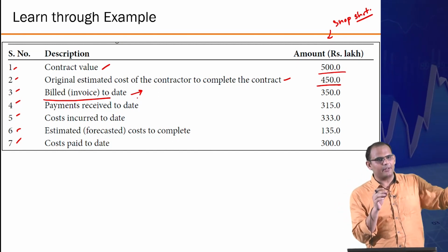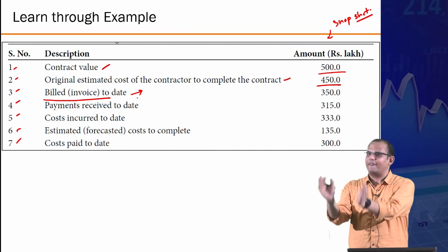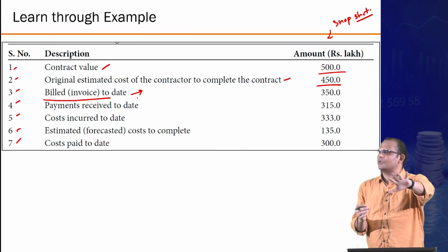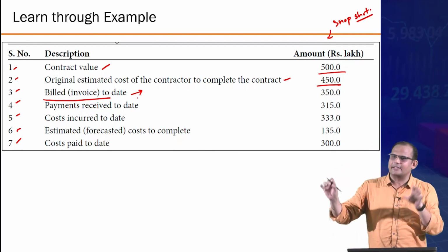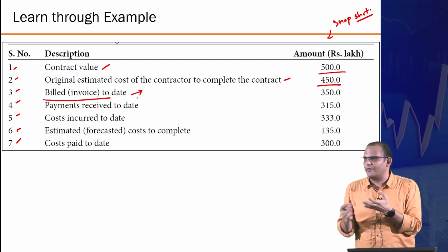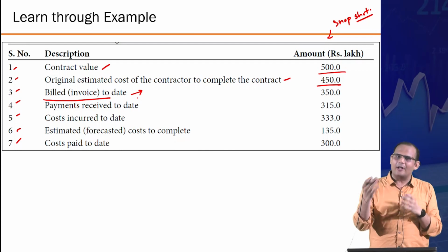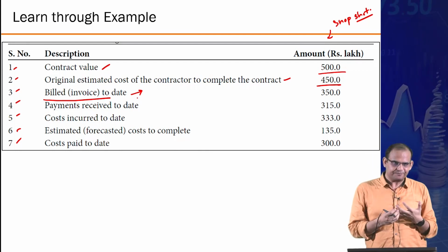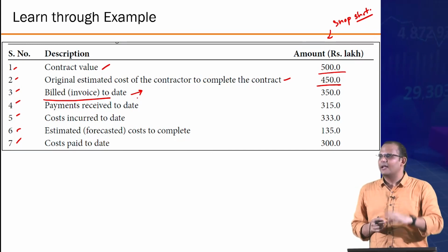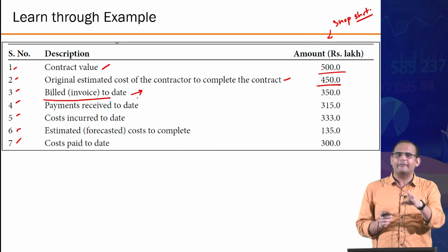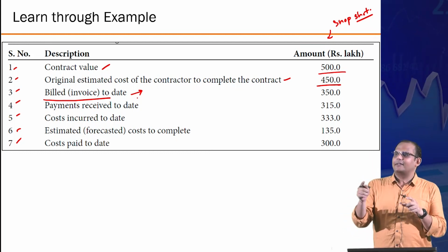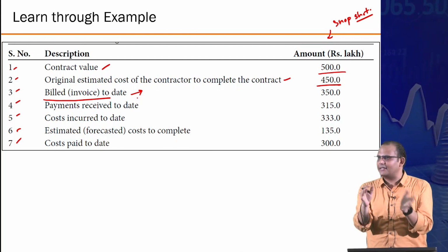Invoice is, okay, based on this discussion between us, this is our final value, this is the official value, how much of this will go to taxes, how much of this is going to come to our accounting, this is the bill, this is the account where you can actually pay the money, and these are the terms and conditions for us to get the money, right? On that, we decide the payment schedule. It's like, I will pay 50% now, I will pay 20% at the time of delivery, I will pay 30% after you have shown me that everything is working fine with this computer or machinery that I am buying from you, right? So this kind of a transaction, zigzag things happen.